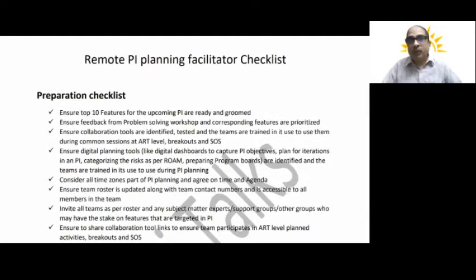Until you have a clear understanding of the dependencies of a feature, be it internal or external, you might not be able to commit the features. In such a case, once you are done with the PA planning, you will end up seeing many uncommitted objectives on the program board, which is really not a good sign.